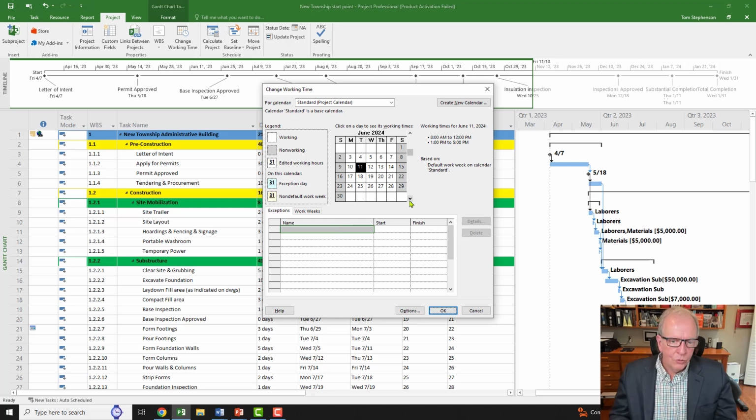And of course, you create a holiday by simply going to a date like July 1st as an example, and you could say basically Canada Day. In the States, it would be July 4th for Independence Day, but we'll just put that here. And then we put a holiday. But you'd have to do that for the duration of your project. Again, I've got another video called Calendar. You could look at that early video on the playlist and check that out. All right, so I'll just click OK here.